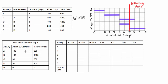Activity B is also complete — we know it's done. Activity C is 33% complete, meaning they've only finished one third of the three-day activity. It also has the incurred cost of the activities, which may or may not match up with the planned costs.